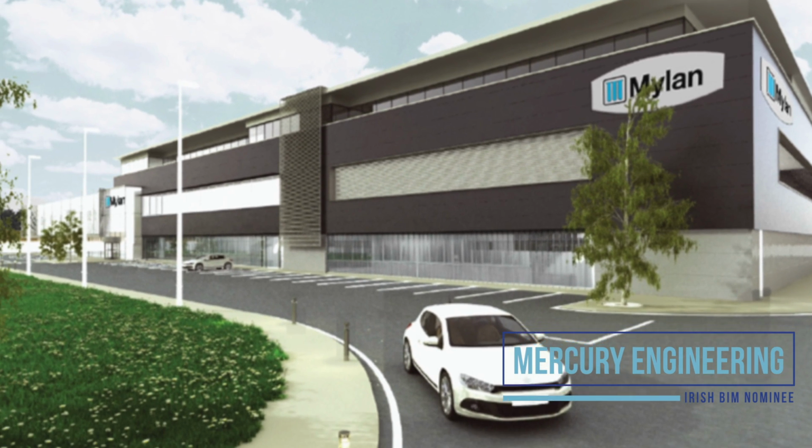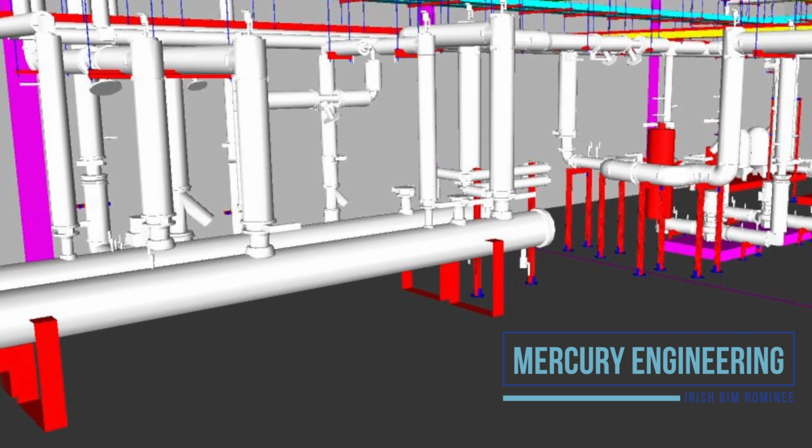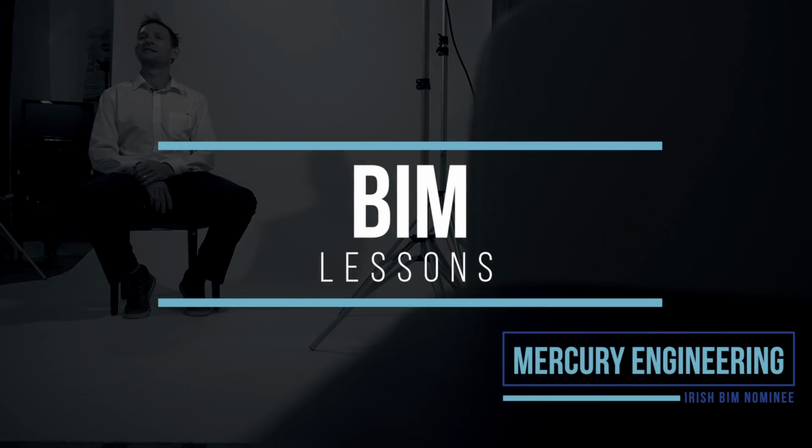as the build progressed. We used M&W Link as a platform to collaborate between all the different subcontractors and main contractors for the project. One of the main key learnings was the use of scanning in the project to allow us to use an already as-built building. It assisted the build, allowing us to bring that information in the already built world into the 3D world.